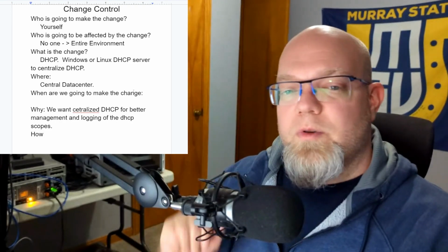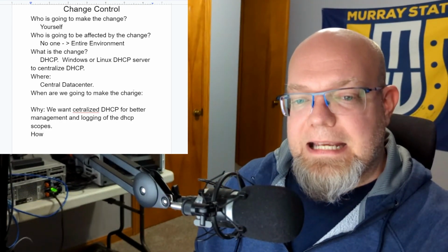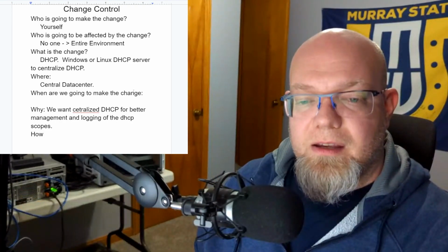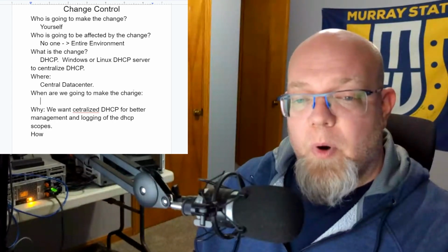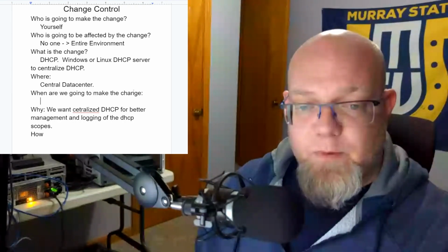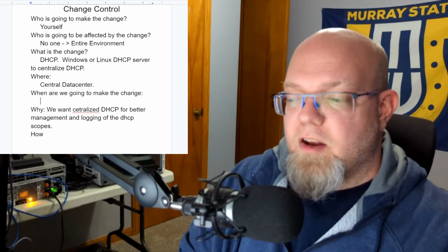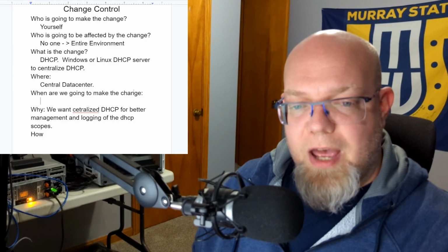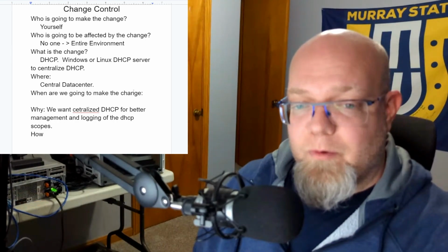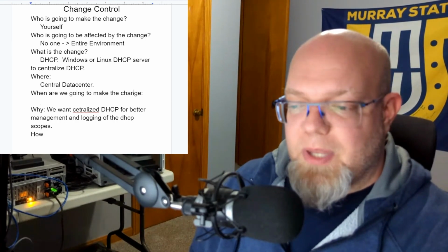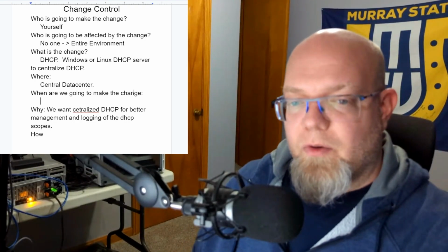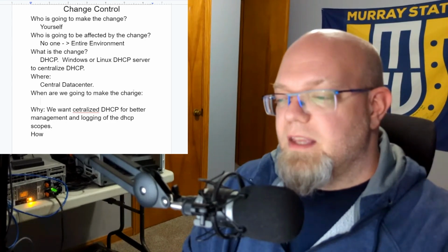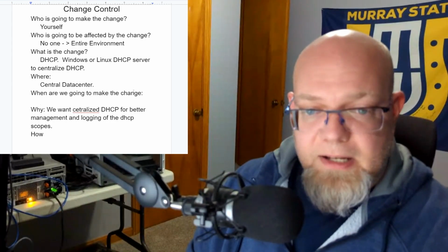So those change levels dictate when you can usually make your change, because your change committee should also have multiple types of maintenance windows, or when you can make changes. You know, during the business day, most of the time, if it's non-disruptive, I've never worked anywhere where they care when you make the change. Sometimes it's more of a do it after 5 and we know it's not critical. So even if it's broke in the morning, and then you have standard maintenance windows.